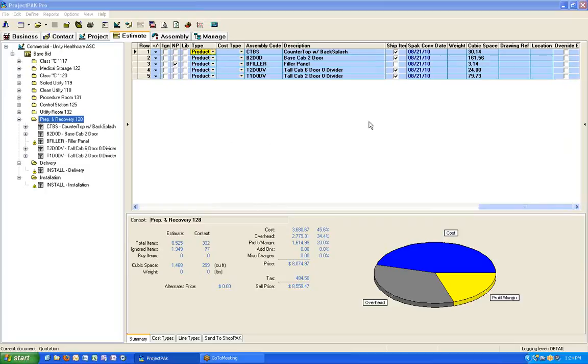So that within our little miscellaneous cost calculator, it can automatically calculate the number of trips you need to make based upon the size of your truck, or at least it gets you in the ballpark. Because hopefully you heard me earlier, the number of trips you can set on automatic, so it'll calculate it based on that, but you can always change it to manual, because there may be times where you think, just looking at it, maybe it's going to take 3 trips instead of 2.